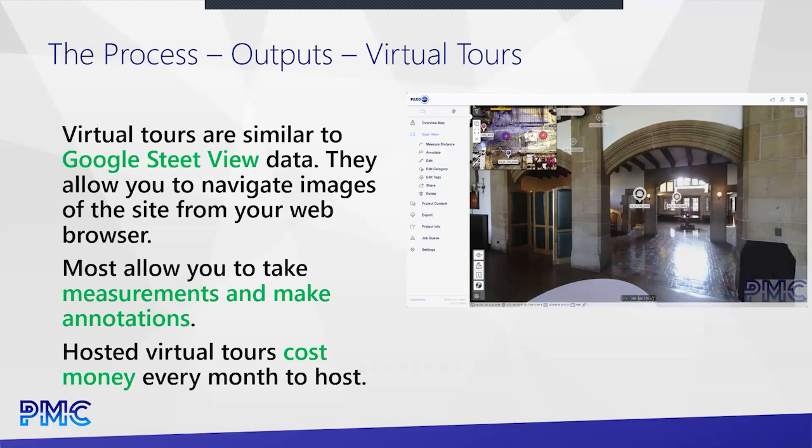So something to keep in mind, in general, your provider is only going to keep these live for a certain amount of time. If they include this at all in the bid, it is going to be time limited. They cannot host these indefinitely for you. And so you may want to consider that when you're negotiating with them, is how long you're going to need these virtual tours made available.